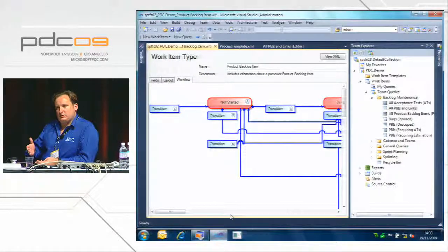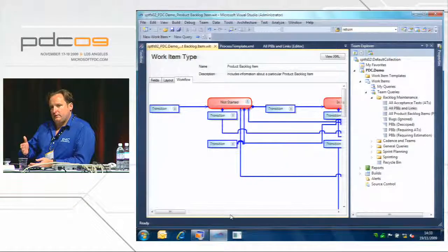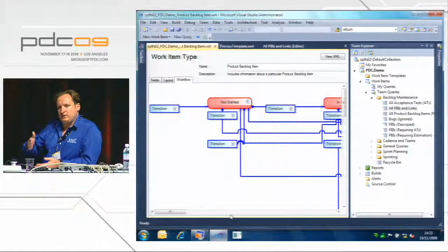So it takes people a little while to get their head around it, but it actually works really well, because if you think about it in Scrum, you have a priority, but then when you go into sprint planning, you don't always necessarily build that priority. And because we've got the ready bucket, it's a great background for a conversation with the business when they've got a bunch of high priority items that aren't in the ready bucket, and they can sit there and go, well, why aren't you planning these? And you can say, well, actually, there's nothing in the ready bucket in that priority system. So the iteration path is always going to override the priority.